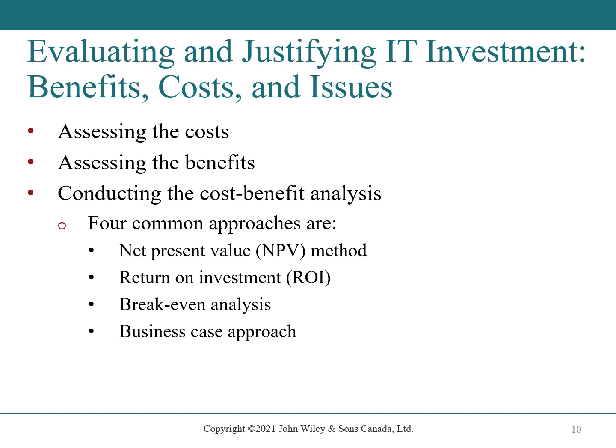Evaluating and justifying IT investment. Benefits, costs, and issues. Under this, we're going to assess the costs, assess the benefits, and we're going to conduct the cost-benefit analysis. 4 common approaches for this are net present value, return on investment, break-even analysis, and the business case approach. Net present value is a method to convert future values of benefits to their present value by discounting them at the organization's cost of funds.